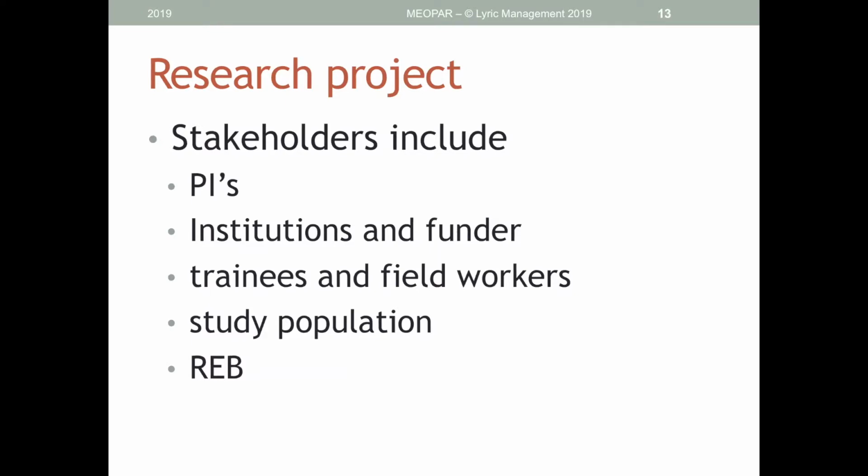So when I look at this, I would think immediately that the PIs are key stakeholders. They're both involved in and to a large extent influencing the work that will be done. It was their original question, questions, excuse me, that the research work is going to be trying to answer. The institutions where the work will take place, as well as the funding agencies, are stakeholders that have a significant level of influence over the project and the work as it's going to be conducted. The institution, of course, for allowing the work to take place within the institutions and providing the administrative mechanisms for people to travel and to host the trainees, etc. And the funder making the decision to fund the project and probably providing some conditions around the funding and how it's going to be used. And so they would have a role to play in influencing the project itself.